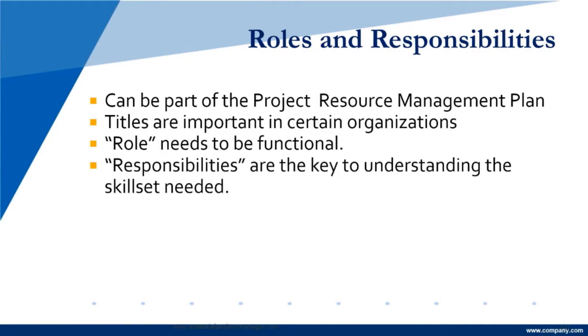The responsibilities are key. So the role may have a title. The responsibilities are their duties. What are they going to do? For instance, a question I asked the resource when he said, I need bilingual. I said, well, am I going to be translating in person or in writing? And they looked at me and they said, good question.